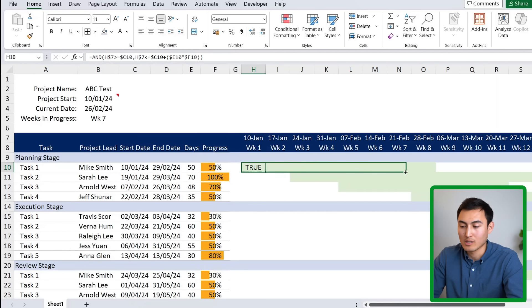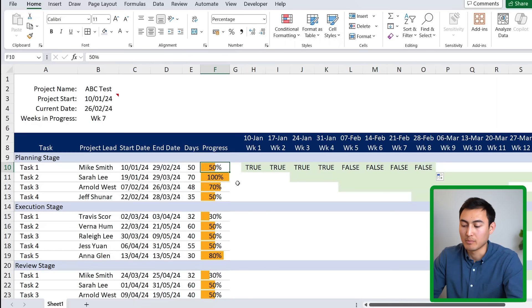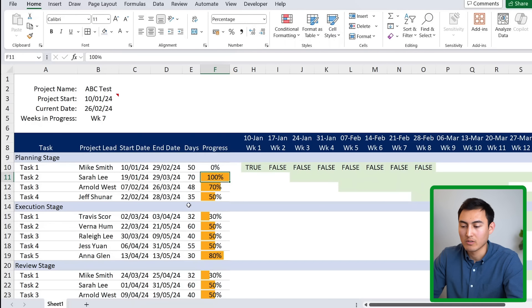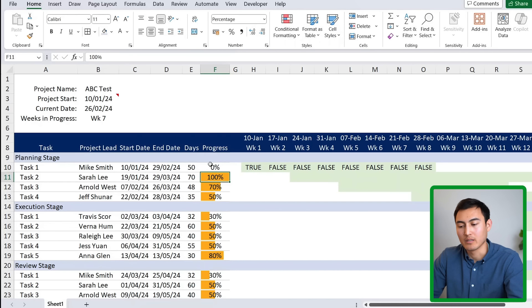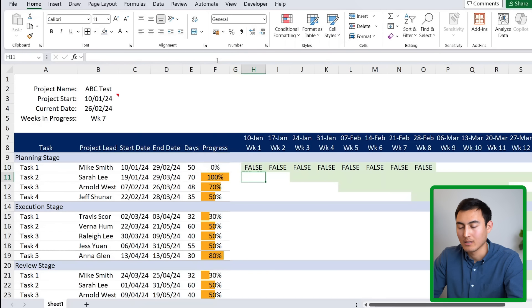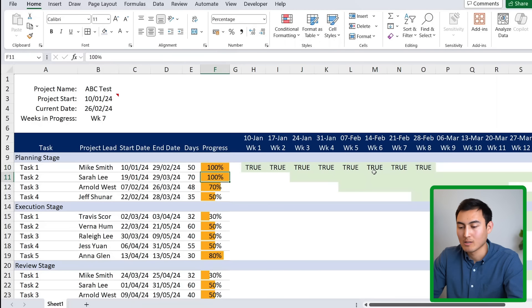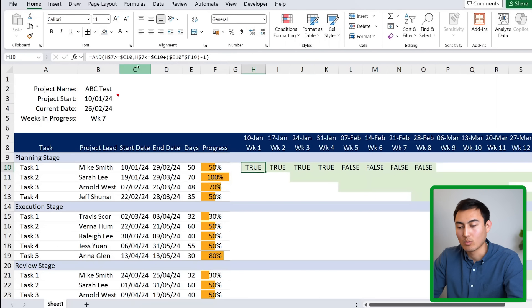Testing the formula: at 50% it switches to FALSE at the halfway point — correct. At 100% it's TRUE all the way across. At 0% there's an issue where it still returns TRUE, so we add minus 1 at the end of the formula to fix that. Now 100% is all TRUE, 50% is half TRUE, and 0% is all FALSE.